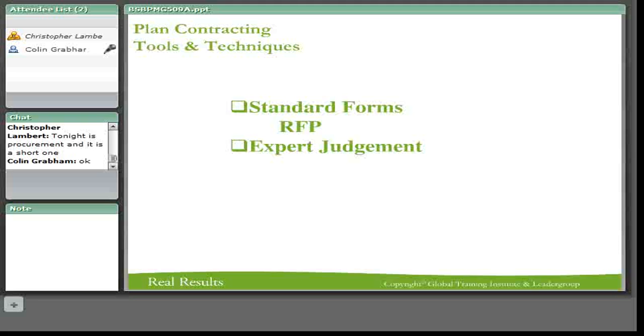I found that very interesting. So the RFP actually said what we're going to do is evaluate technically, from a competence perspective and all of that sort of thing. And then after that, we will open the sealed envelope where you've got your prices in it, and we'll look at your price.